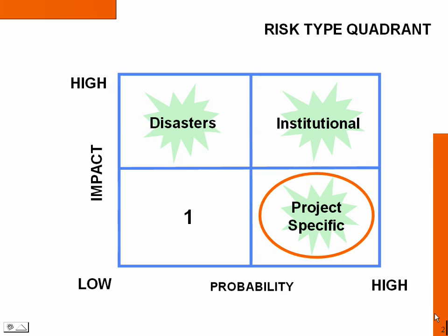The risks that remain the direct responsibility of the project manager would be risks that are high probability and low impact. When thinking of this part of the quadrant, I like to call it death by 1,000 cuts. It is in this quadrant that we see those daily project challenges, late shipments, changing customer requirements, as well as technical challenges. Each of these daily hassles alone will not cause a disaster. However, combined, the thousands of daily risks and our inability to manage them effectively can erode our competitiveness and leave us in virtually the same spot as if we had suffered through a disaster.